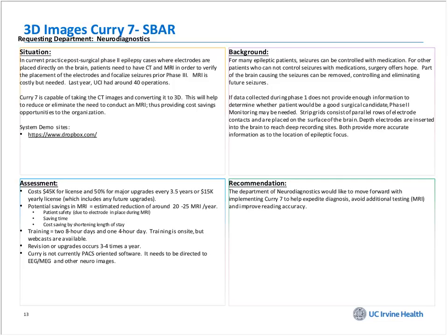But everything is laid out in here, and then you get a recommendation that ends up going to that functional group. Hopefully, depending on the cost, they will approve. But if it's greater than $500,000, it would go up to our executive governance, and then this SBAR approach would be used at the executive governance as well, with the stakeholders present and presenting their case.